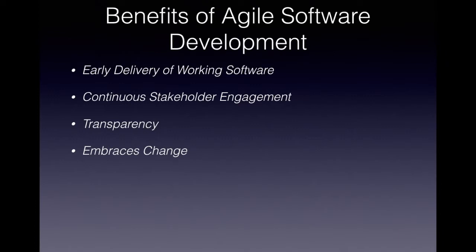The product manager may also add new changes based on market conditions, research, or the showcases and deliveries from past sprints. If there is a need for new additions, new stories, or new features to be added to what has been developed, agile software development embraces that change. A new story can be added to the backlog, prioritized, and worked upon in further sprints.